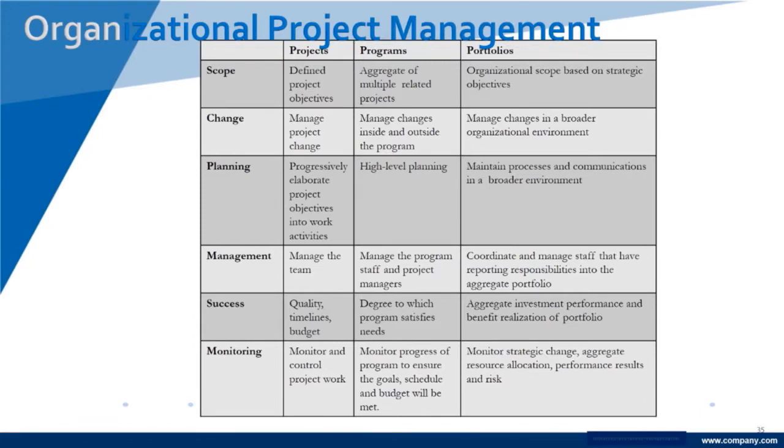Remember, if I'm building a house, I need to know when the concrete's being poured. Why? Because concrete takes a while to dry, and I can't do anything while it's drying. So it's important for us to get those kinds of activities straight and understood and on schedule and communicated. Now, on a portfolio, monitoring is again at a higher level. A lot of times, what we're looking at on a portfolio is dealing with the risk, looking at what is risky about the situation we're going into. It could be that it's not risky at all. It could be that it's extremely risky. But across the different projects and programs underneath that portfolio, we have higher visibility and less detail on the portfolio side than on the program or project side.